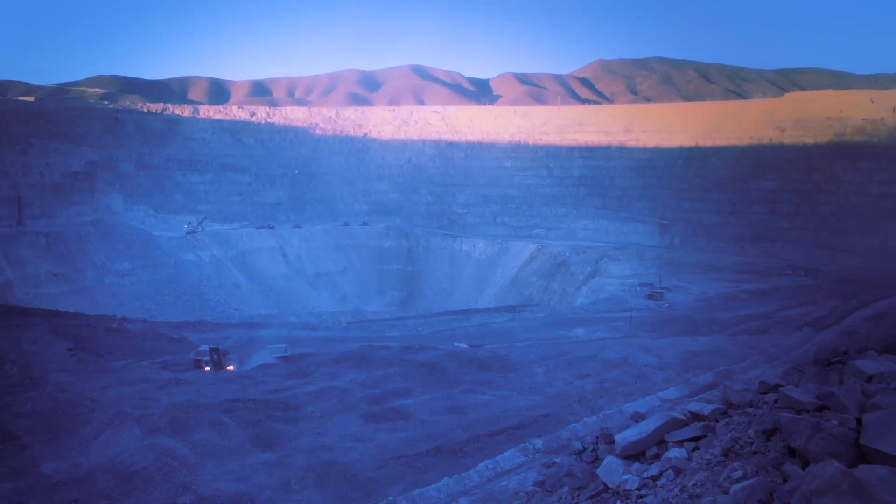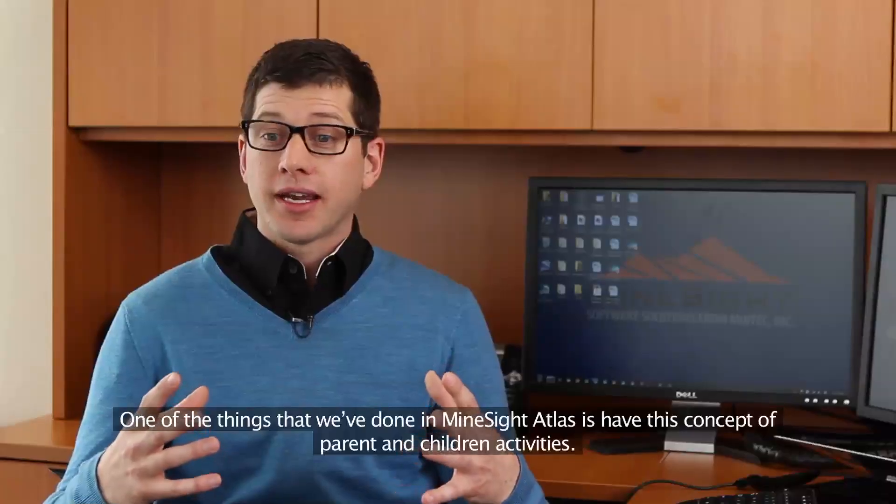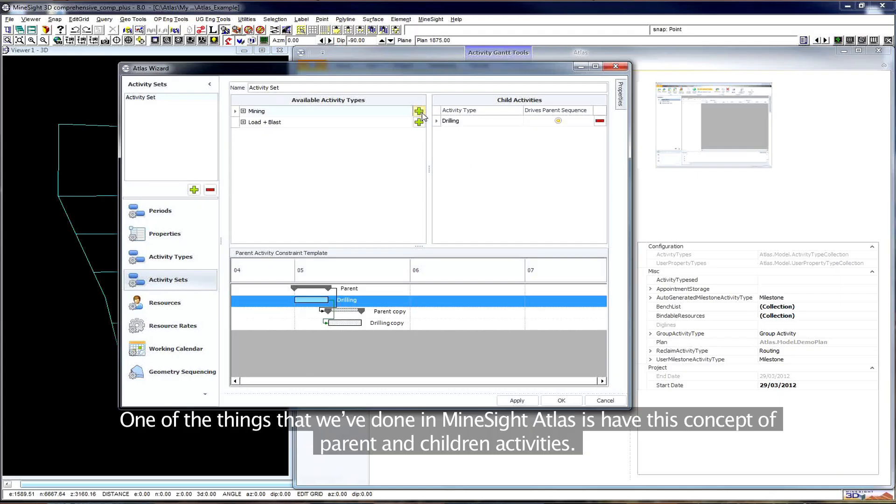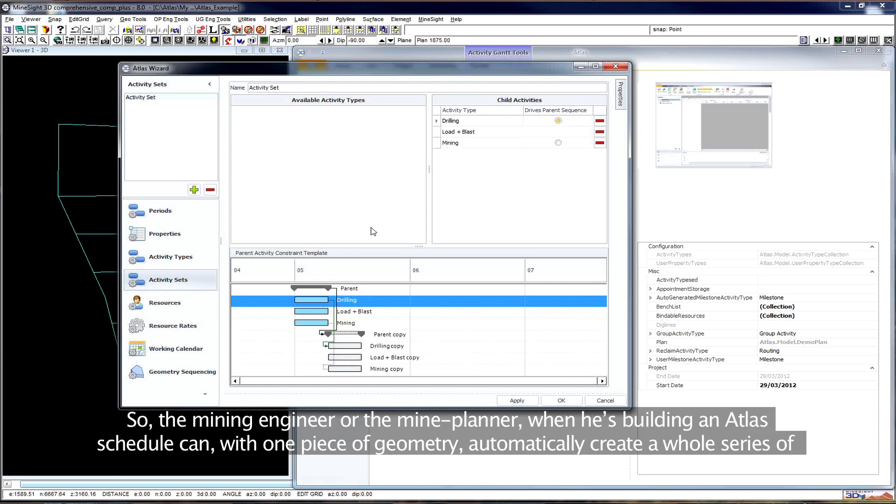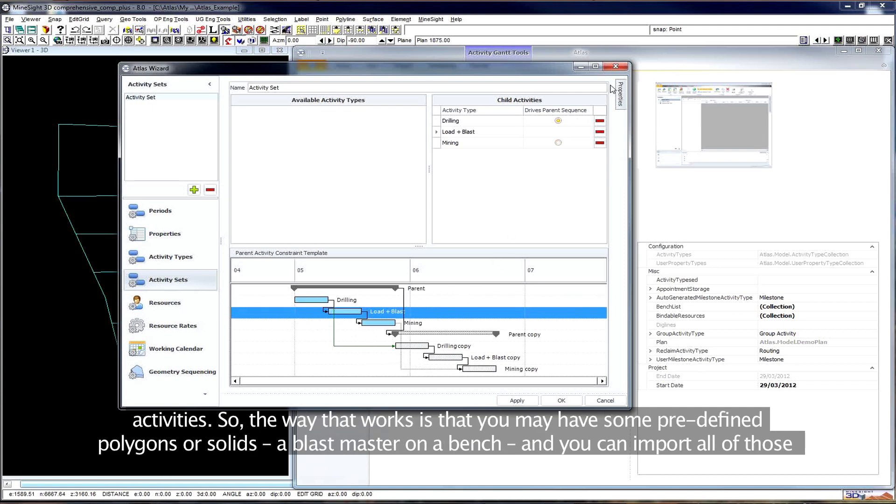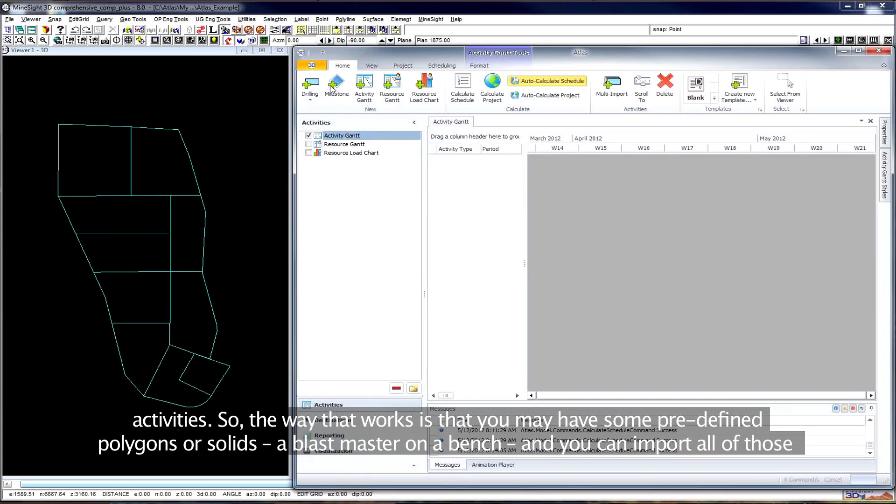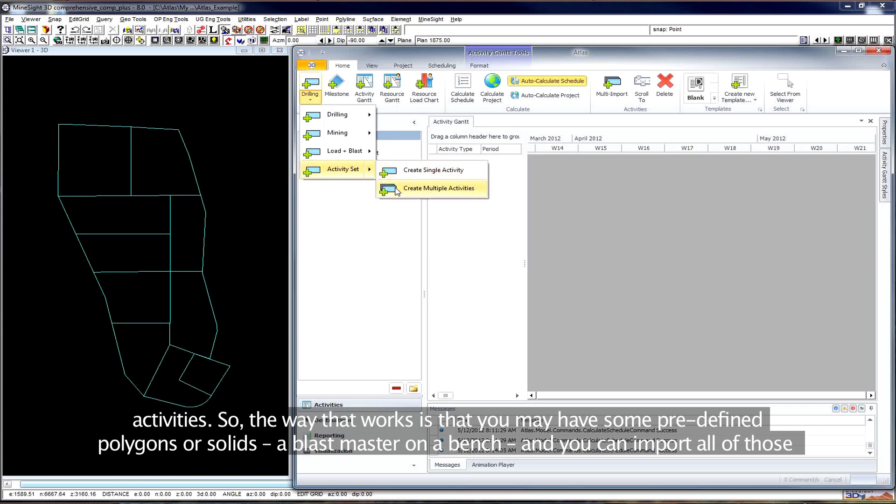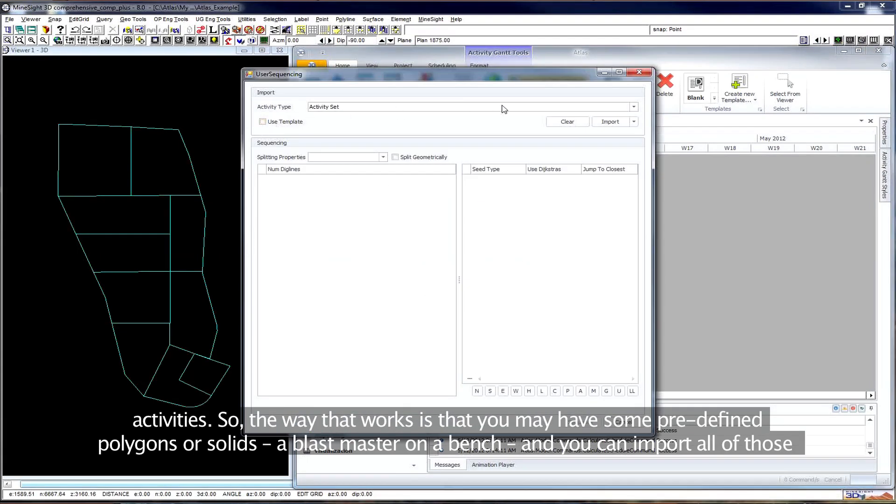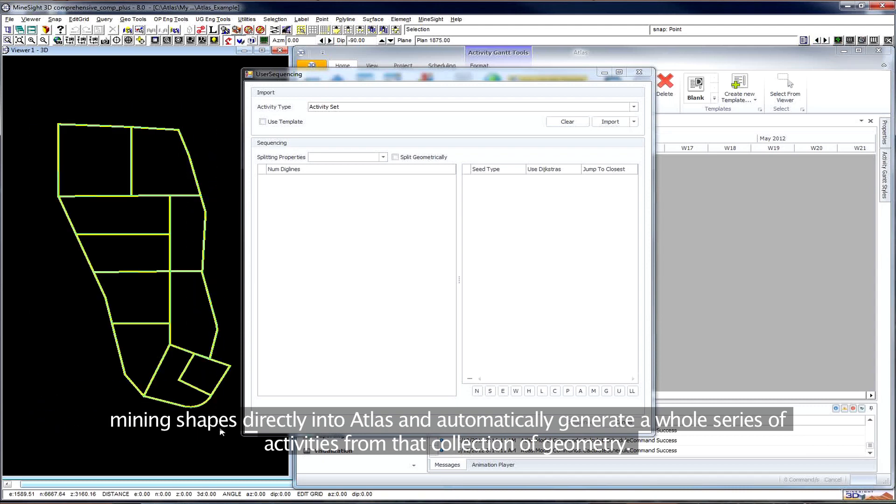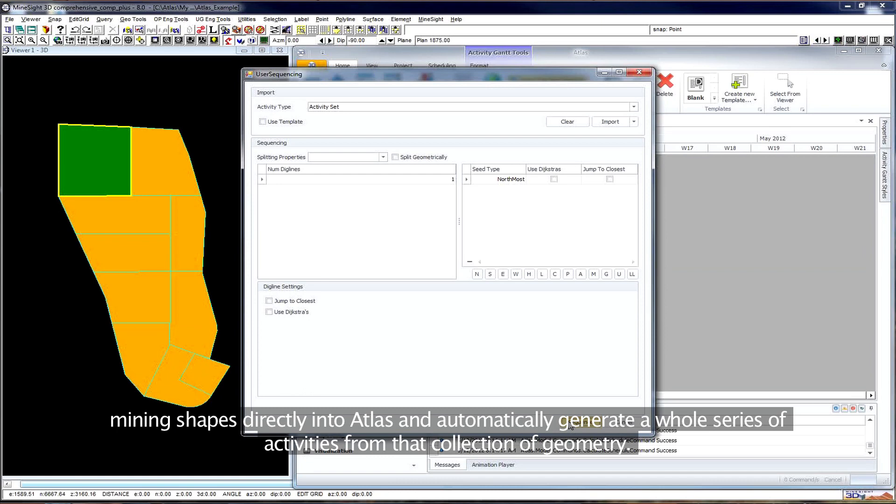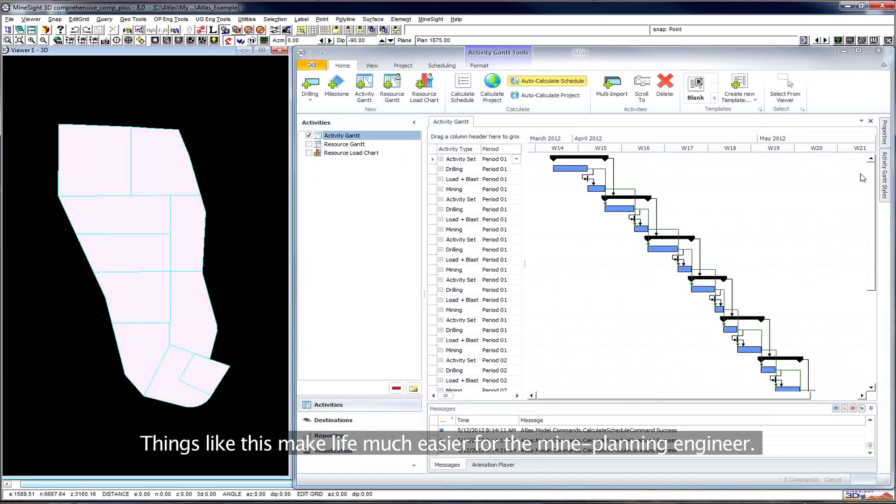One of the things that we've done in MineSight Atlas is have this concept of parent and children activities. So the mining engineer or the mine planner, when he's building an Atlas schedule, can with one piece of geometry automatically create a whole series of activities. The way that works is that you may have some predefined polygons or solids, a blast pattern on a bench, and you can import all of those mining shapes directly into Atlas and automatically generate a whole series of activities from that collection of geometry.